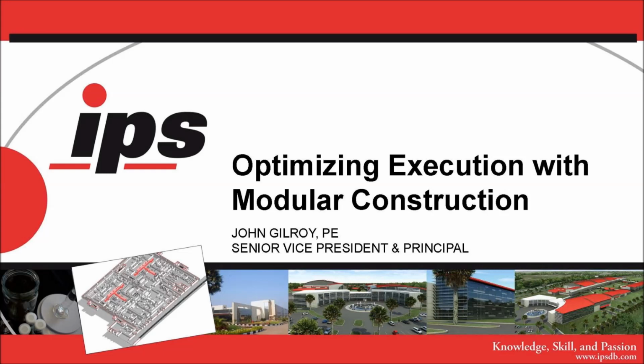With modular, in some systems you have to give up some ability to change at a certain point, which is sometimes not available. And it's bringing contractors and subs and vendors on board during the design process and leveraging their knowledge, and I think that's critical to any design, any delivery of any project. Change control monitoring is critical from an owner's perspective and concerns.